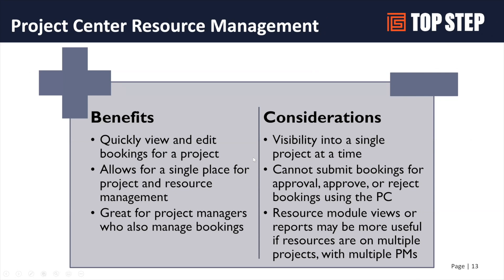So, in summary, the benefits of the Project Center include the ability to quickly edit bookings for a project and having one place to manage your project and resource management — where project managers are making changes directly rather than requesting changes. What you need to consider: you are updating one project at a time, so you're not seeing the impact across projects. You cannot use booking approvals as part of the Project Center today — no formal approvals or rejections. And if you're moving resources around across multiple projects with multiple PMs, you'll want to monitor for potential conflicts that may be created.